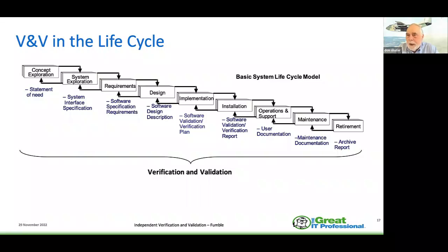Can I take this and install it? I think those are some of the key questions. Do I have the right screens, and do all the screens go to where they're supposed to go? Sometimes this isn't even complete until I get into operations and support. And then finally, I've got maintenance, documentation, and I can bring in and do verification and validation on the maintenance and do it maybe once a year, maybe once every 2 years, depending on the system that I'm using. And many times this maintenance verification and validation is built into the contract, especially for mission critical systems.